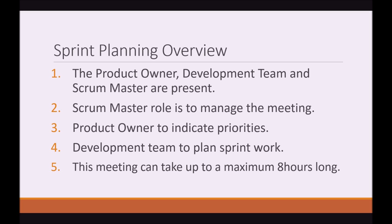This meeting can take up to a maximum of 8 hours long — that is for a 30-day Sprint. Normally, I do a 2-week Sprint in our team, and if you're doing a 2-week Sprint, your Sprint Planning Meeting should only take 4 hours.